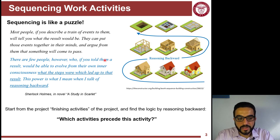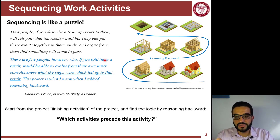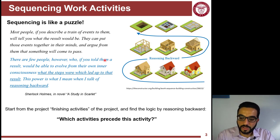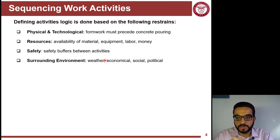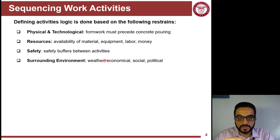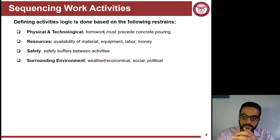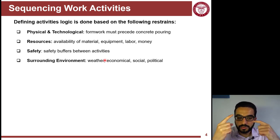The sequence is the logic, and you answer one question every time you backtrack: for each activity in your WBS, ask 'What activities precede this activity?' You have to think about what this activity depends on. When answering, consider four types of dependencies. First, physical and technological: beams need columns in place first, columns need the floor done first, and you keep backtracking until you reach the foundation.